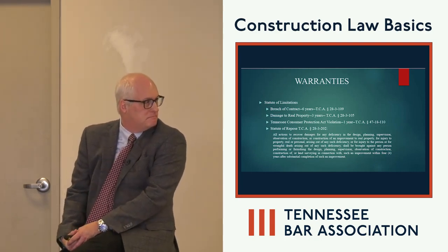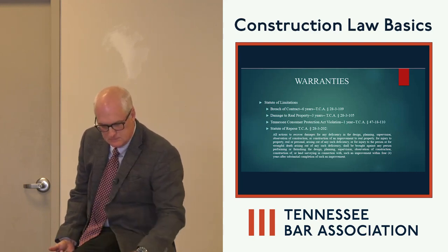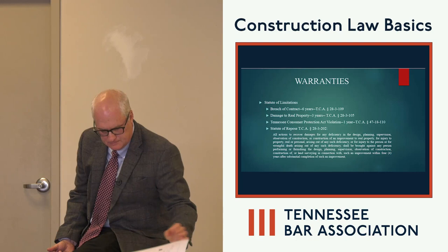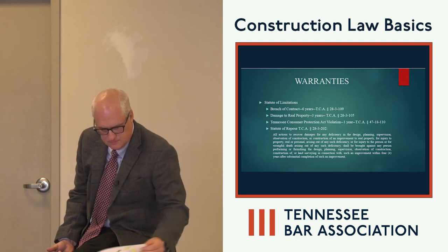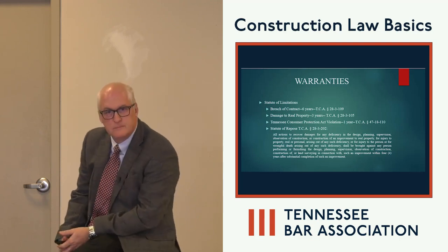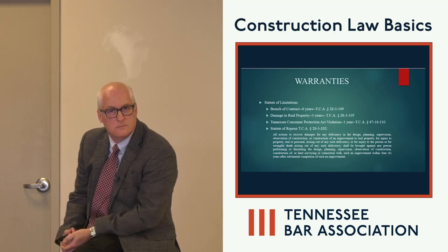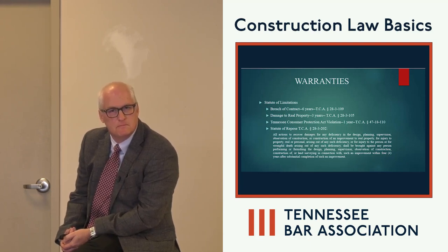I believe the answer is technically no, that it's not actually in there. There's wording in it that implies it, but it's actually not in there. I may have read an article one time talking about it. Yeah, there's a well-known article called The Myth of the 1-Year AIA Warranty. You ought to look it up one time. What AIA contracts have is a 1-year, open quote, correction period, close quote. There's actually language in the A201 that says this is not a warranty.